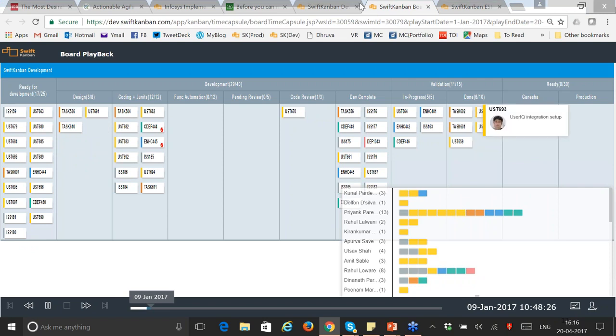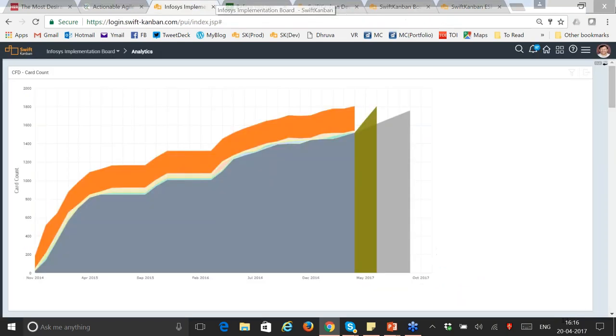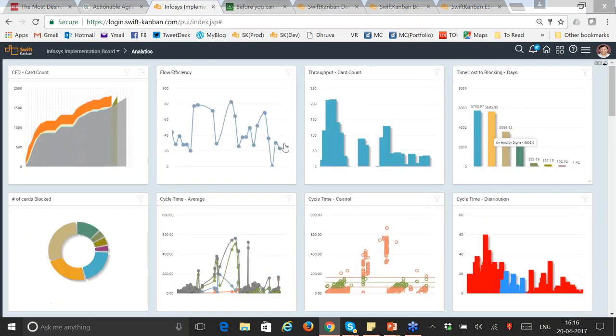The other capability that we often land up using is our block card analysis. So you can actually see the different cards that have been blocked, and you can see the reasons why they have been blocked. So therefore, you can actually see in this case that there was a product defect. So you can see how many days of cycle time have you lost because of cards being blocked for different reasons. And that gives us basic Pareto data that you can now prioritize and do subsequent analysis to be able to drill down and put some corrective action in place.